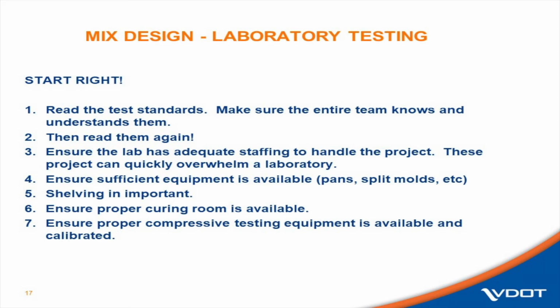Ensure the lab has adequate staff to handle the project. This has been a huge issue for any lab. These jobs generally occur during the construction season, April through winter, when all labs are at their busiest. So when all of a sudden 132 buckets of material come into a lab, they're just overwhelmed. They don't have the staff for it. They have to decide which job gets put on hold to rush these samples through. So make sure your lab can bring in extra resources of people.